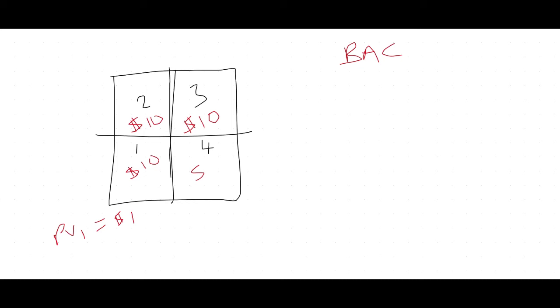imagine on this project, we're supposed to paint this panel on day 1. But if we didn't paint all the panel and we painted 3/4 of the panel, how much work have you done? 3/4, right? What is 3/4? It's 75%.